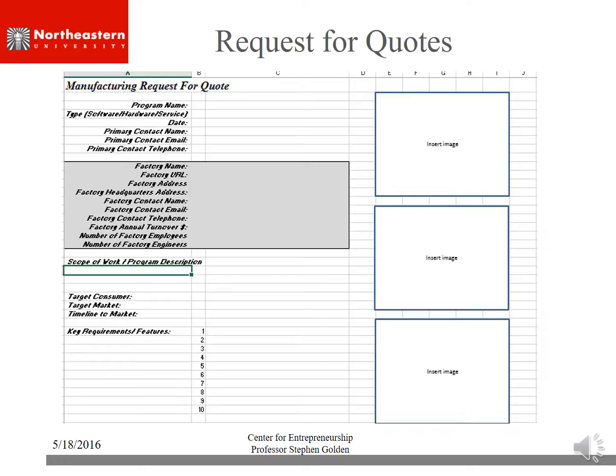And then the last thing is when you ask for a quote on a product, in my company, we use volumes of 10,000, 20,000, and 50,000. And I know some of you will have projects that you think you can do 5,000 or 600 pieces.